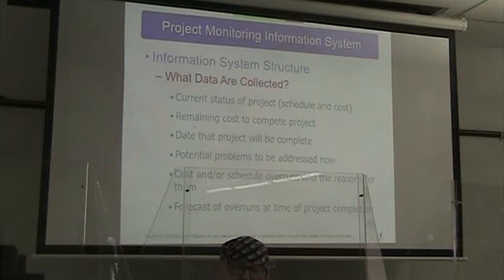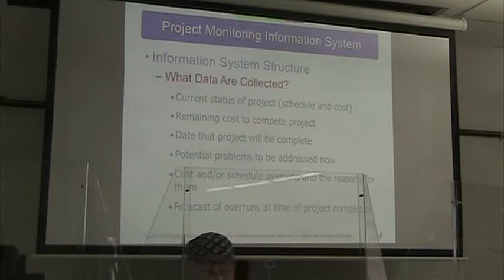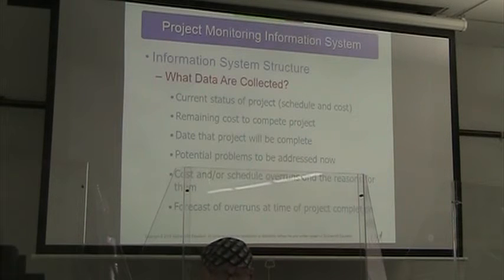We report on the remaining cost to complete the project, the date that the project will be complete, the potential problems to be addressed now, and as I've tried to emphasize many times, we always report any problems we're having and how we are going to handle them.